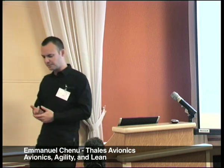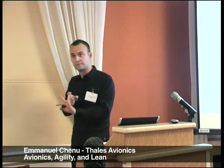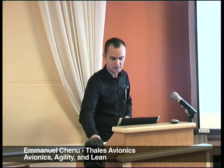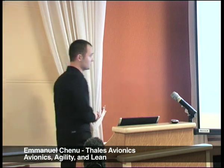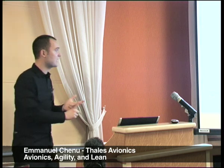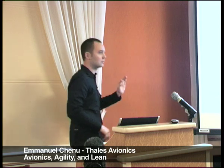And each team member has to answer three questions. What has he done yesterday? What does he plan to do today? And what slows down his work? Daily stand-up meetings synchronize the team workers and their activities. And of course, we practice continuous integration. Continuous integration creates a steady flow of tested, integrated, and shippable code. So thanks to these two practices, we synchronize teamwork and the product so they are desynchronized as short as possible.